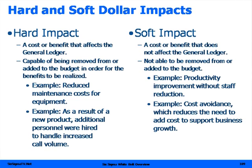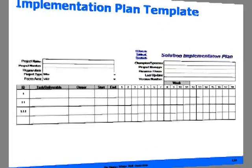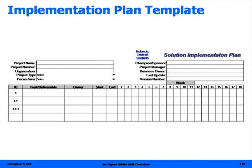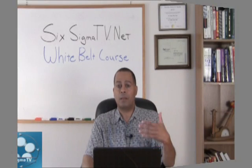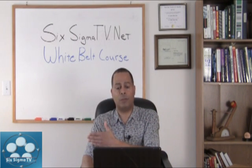Hard impact are things that go to the ledger. Soft are things like productivity improvement without staff reduction, cost avoidance, those kind of things. This next template is your implementation plan — how are we going to implement all of these solutions? Who's going to own them? What's the start and the end and the deliverable? You can pull this template down from our website, change it around and make your own. But this is your implementation plan on all of those piloted solutions — who's going to do it by when.